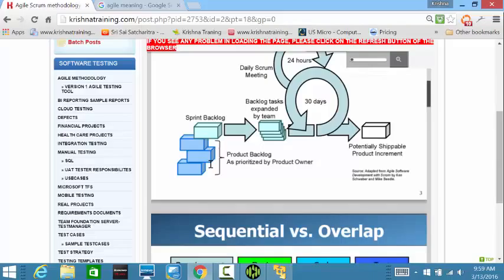the QA team cannot do any testing because it's still being developed. It's a small piece of work for the requirement, and they have estimated that it would take only 10 days. So let's assume we follow a happy path where the development team can complete the development of requirement one. Now, during these 10 days, what the QA team would be doing is talking to the development team, the product manager, or the business analyst to understand the requirement, what exactly it is about.